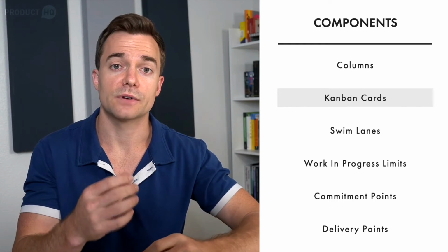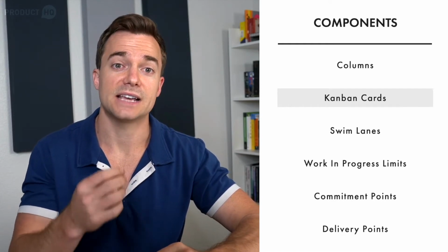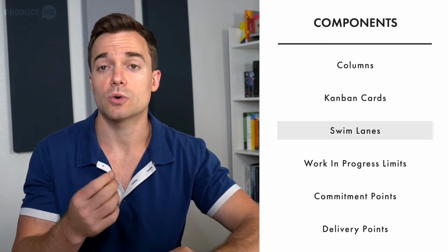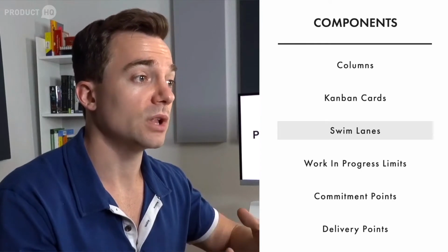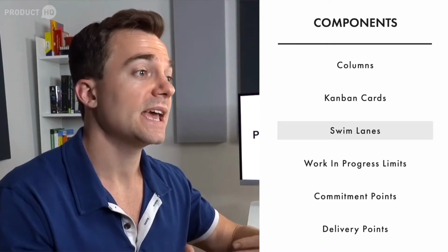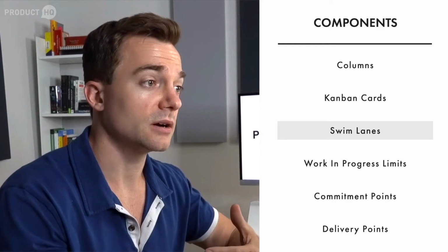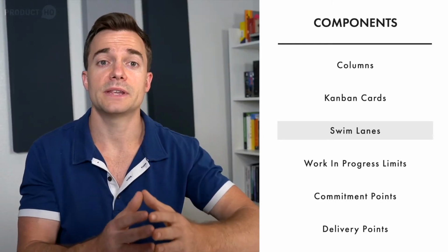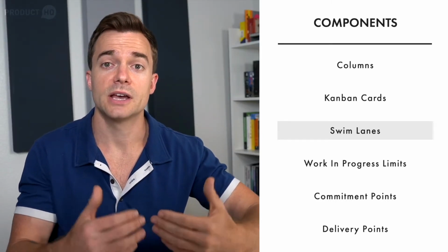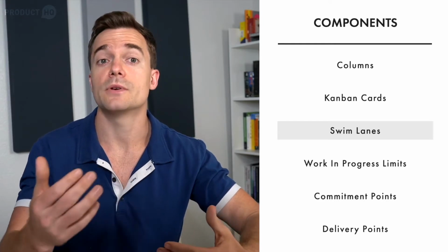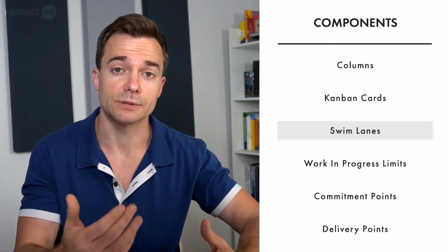While the columns are vertical representations of the tasks at hand, swim lanes are horizontal. The swim lanes help better visualize the work of cross-functional teams and how their tasks are dependent on one another. This way, companies can keep an eye on the potential bottlenecks that are caused by one group that can't move forward because they are waiting on the other group to be done.